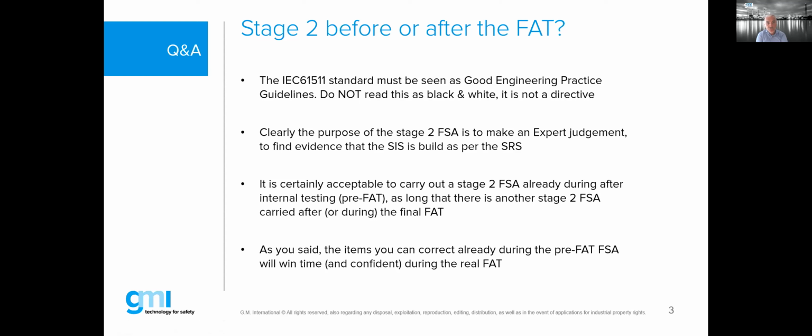It's always good to do as much testing as possible before you do the test witness with the client. In other words, after you have done your internal testing, maybe you call it your internal FAT, I wouldn't mind making already a judgment to find out how good this test has been performed and how much evidence you can provide that the system has been designed as per requirement specification.